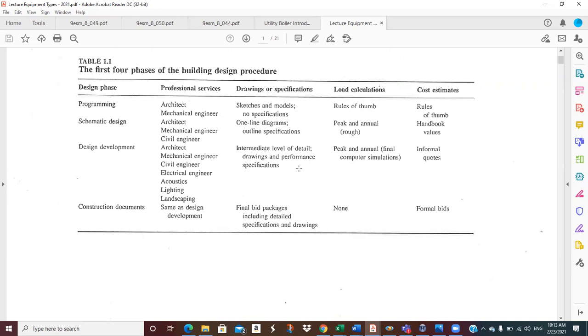And then they have bid opening day. If it's a state job, they pretty much have to take the low bid. If it's a private job, they can take any bid they want to. They don't have to take the low bid. They can go through them and say, well, this one's cheaper, but I like this better, so I'd rather pay more, and I'm going to go with this guy.